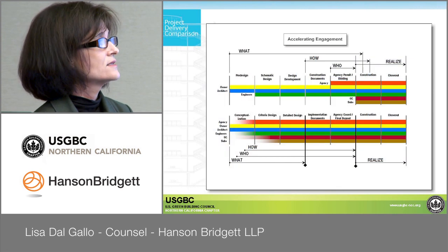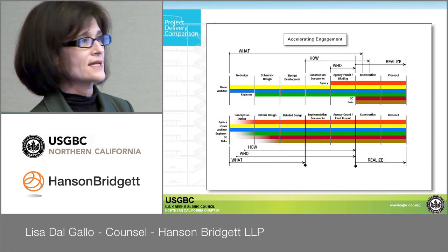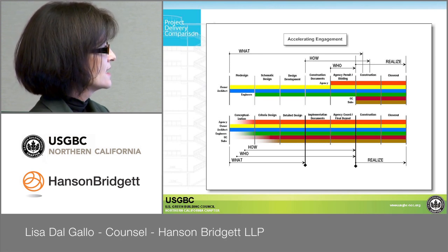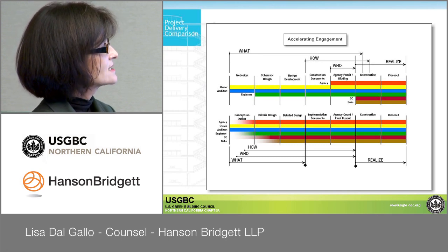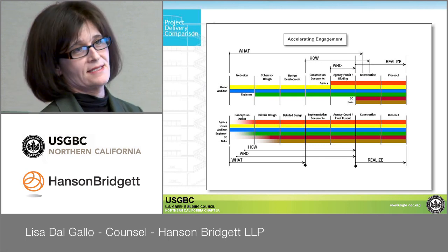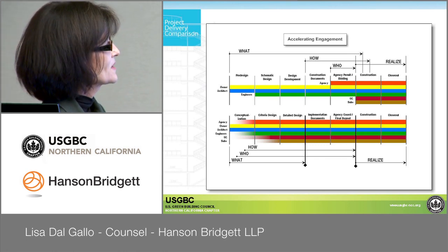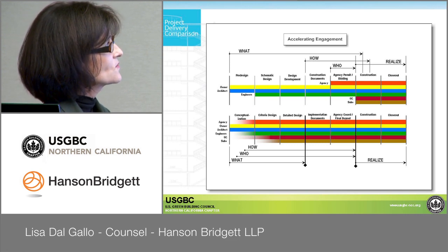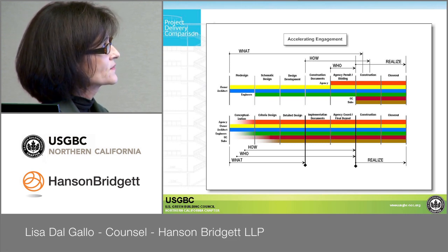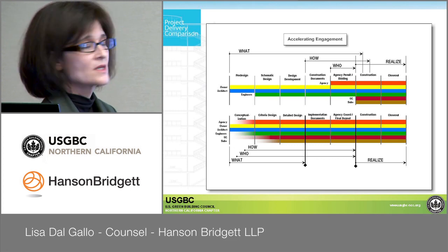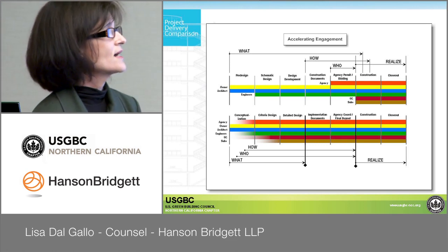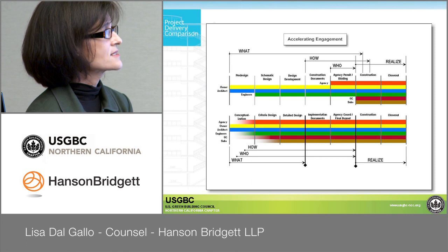This slide actually demonstrates the difference between a more traditional approach up here and an IPD approach. And it's the how, who, and what slide, I guess, is a good way to put it. And you'll notice that on the top traditional approach, you don't really determine what's being built until here. And at this point, this is a design bid build scenario. You've already gone through the whole design and all the permitting, and now you finally know what you're going to build. You're in the submittal process.